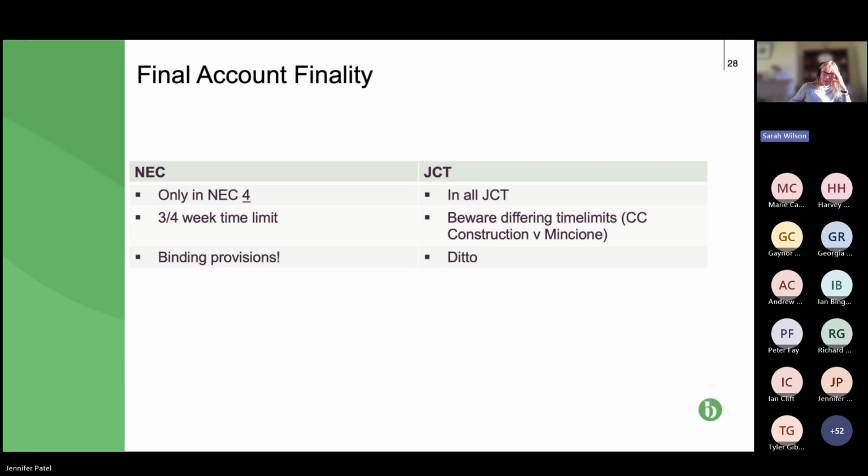And then if what is claimed in the final application for payment isn't paid, and can't be negotiated to the satisfaction of both parties, then inevitably the contractor decides whether they just leave it and walk away or do they pursue it to adjudication. So it all worked quite nicely.